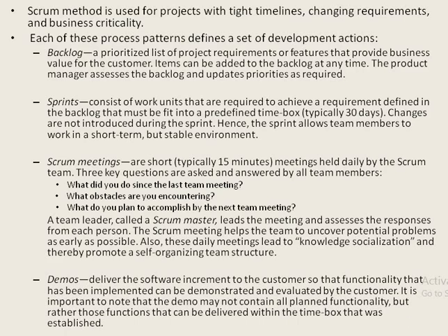The last action is demos. Demos deliver the software increment to the customer so that the functionality that has been implemented can be demonstrated and evaluated by the customer. It is very important to note that the demo may not contain all planned functionality, but rather those functions that can be delivered within the time box that was established.